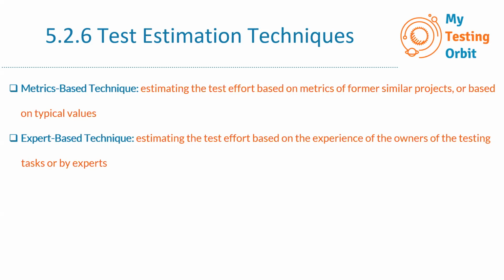So that's why when we are estimating, it is dependent on different factors as we just covered, and they are broadly categorized into two different techniques. The first one is the metrics-based technique. In that, we estimate the test effort based on metrics of former similar projects or based on typical values. And the next one is the expert-based technique.